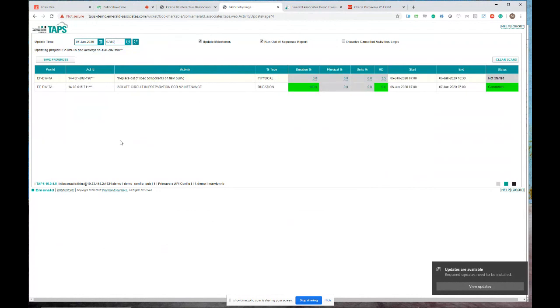But you'll notice this next one I've scanned is physical percent complete. Yes, you can update units, physical, and duration percent with tabs. I'm not suggesting you will necessarily run into this on every turnaround, but don't forget this tool is very useful on any schedule. So if I go into update this particular one, it is physical percent complete, so I'm saying 50%. Now you'll notice that I can scan duration percent complete as well. Now they're telling me, yes, this one is 50% done as far as duration goes as well.